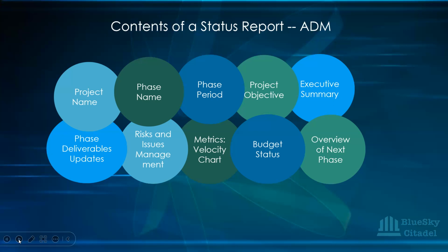And then you're able to use that chart to analyze and tell them that, based on the fact that our timeline is at such a time, and we've done 98% or 89%, with the remaining 11% to be completed, and knowing that our timeline is maybe a month's time, you're giving them assurance that that particular one would be delivered. It's possible that you're working on more than one epic for that project. Let's assume you're working on 2 or 3 different epics. They are in your chart, with the completed, the remaining, and their percentages on top of them.